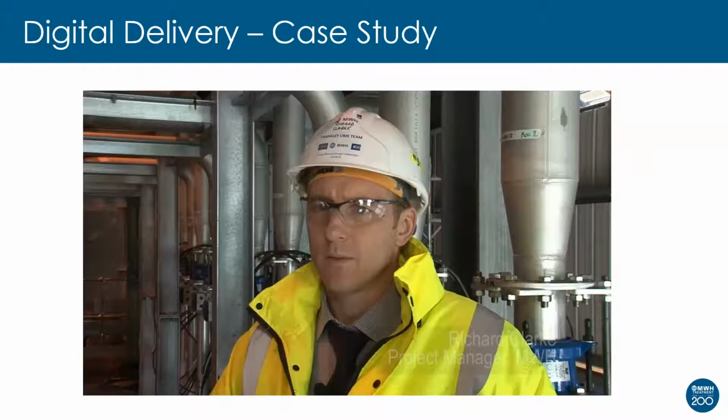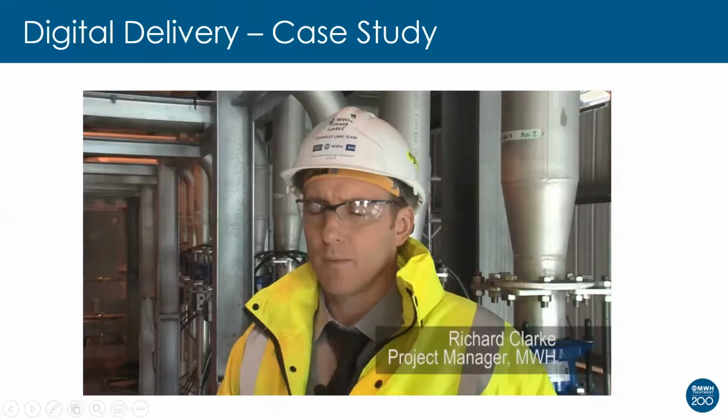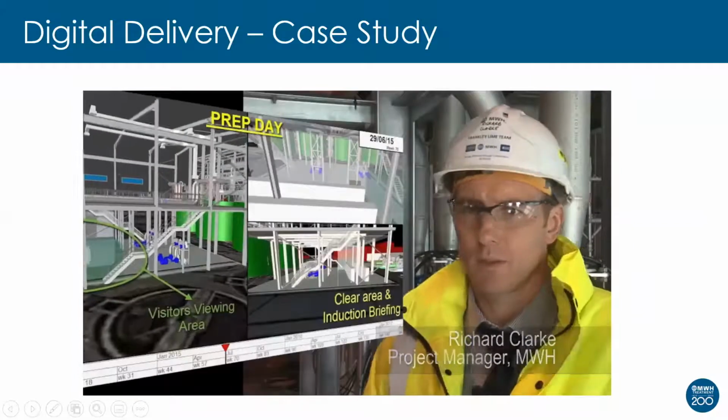So this project absolutely nailed it. From day one, they set out a strategy. That strategy did include a significant proportion of off-site assembly. I think their target was 70%. And by setting out the stall from day one, everybody buying into that delivery method, this is what the guys were able to achieve. Started with a 3D model, so we're not producing lots and lots of 2D drawings.